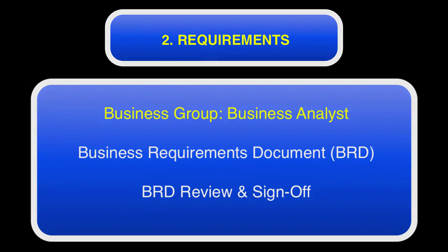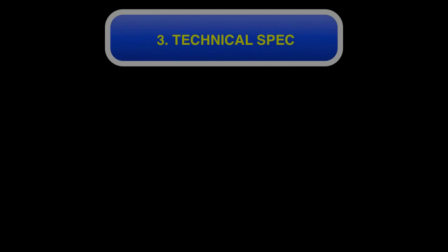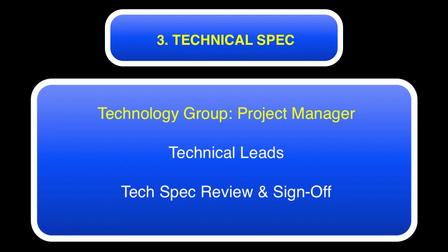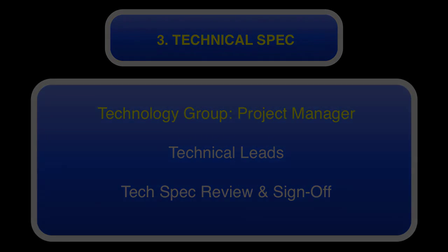The next step is the technical spec. The project manager takes that BRD and translates it into a technical spec, and also names members of the development team. Each system area has to name a technical lead. They're going to attend all meetings, involve other members of their groups as necessary, and write technical specs for their systems. The project manager then combines all those requirements into one tech spec. Then there's a tech spec review and sign-off meeting with all stakeholders.